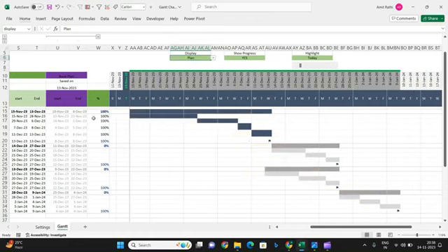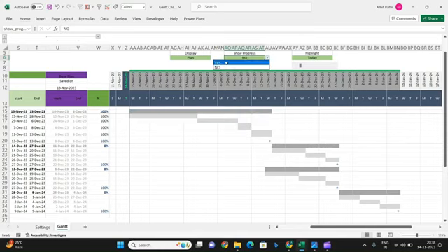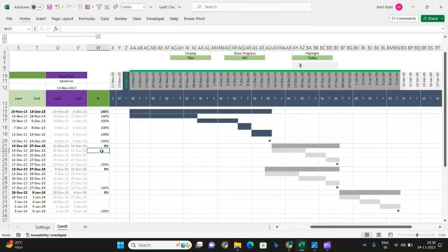Not only this, I have these progress charts which I can either hide or I can show. The project will move according to it, you can see here, if I make it 75, the project will move. Make it 60. Flag doesn't come because my project is still at the 75 stage. So if I make it all 100, and I have the flag here, that means this stage is also complete.